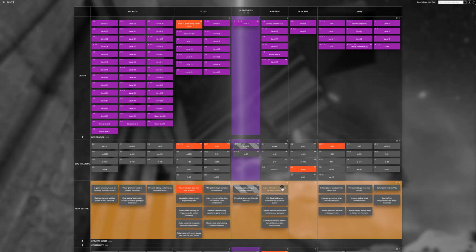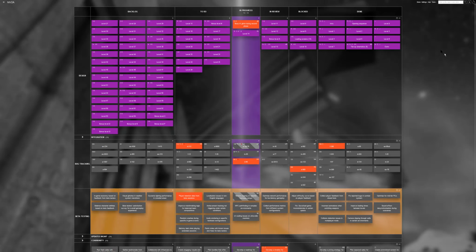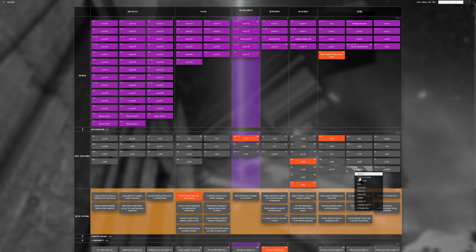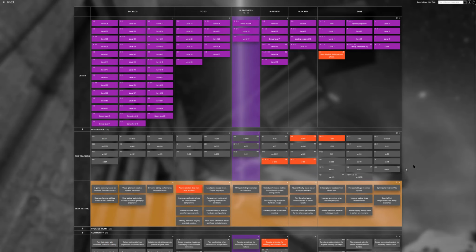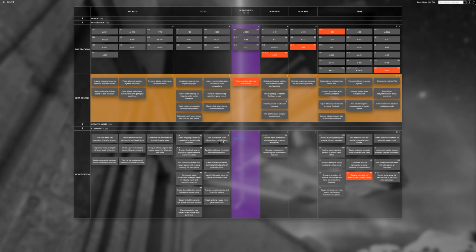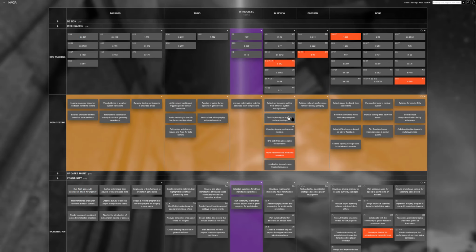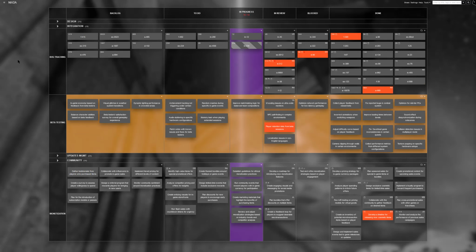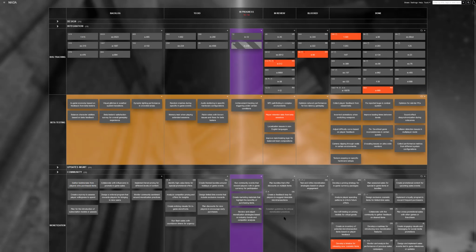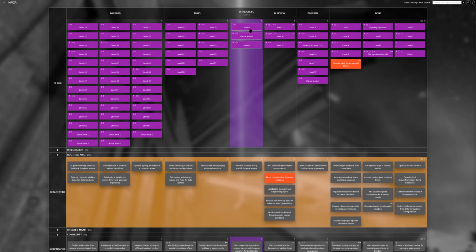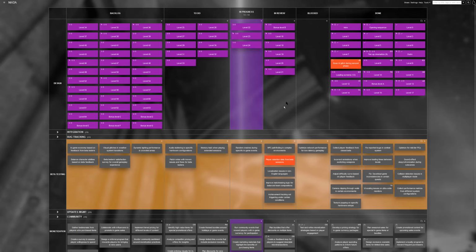Using a Kanban board in game development is like leveling up your team efficiency. Everyone, from designers to coders to testers, can visualize what is happening at all times. It also allows them to spot bottlenecks early. When a coding issue or an art asset delay begins to block the flow of tasks, you see that on the board and work to fix it fast. A Kanban tool board also aids your product adaptability, as new features are tested and improved in real time, without waiting for an entire sprint to finish.